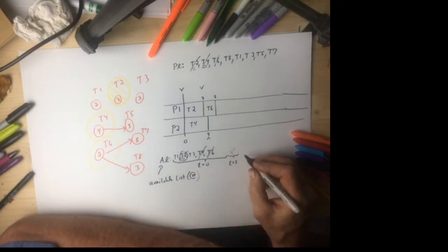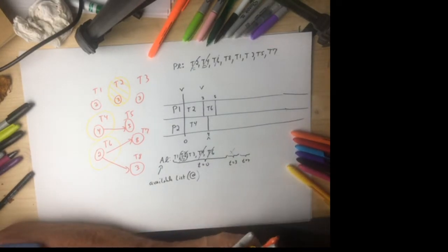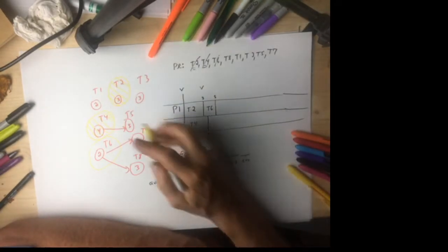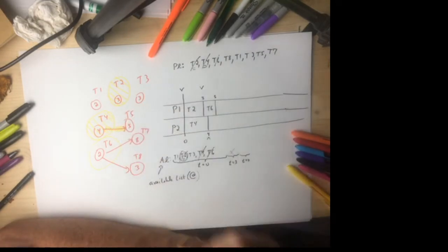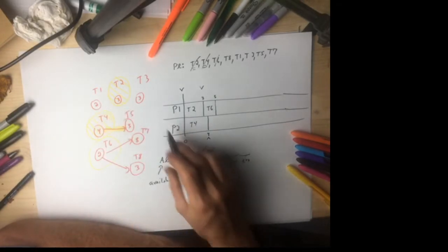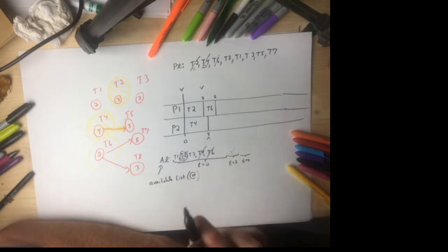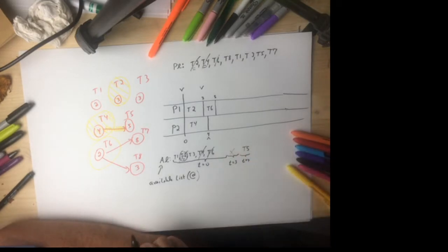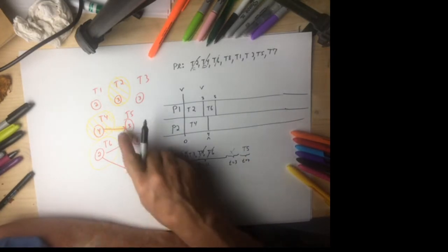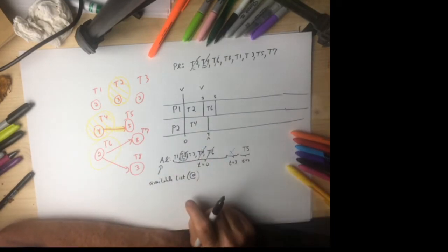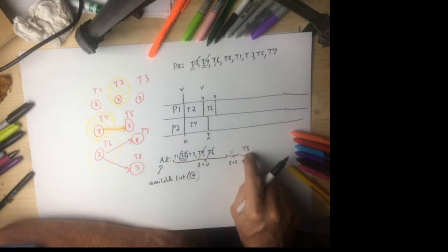So at time equals 4, when I get woken up, I ask, oh, anything interesting happened? Well, yes, something interesting has happened. T4 just finished. And that means the dependency has gone away. So at t equals 4, we still have T1 available, T3 available, T6 being worked on, but T5 just became available because no arrows coming to it. T4 is completed.